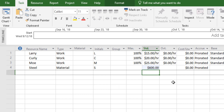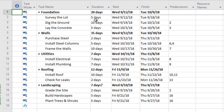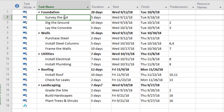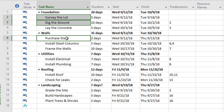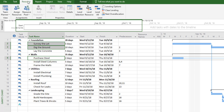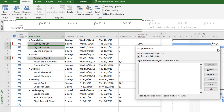Now I'll go back to the Gantt chart view. If I go to the resource names column and select one of the cells, a drop-down appears and I can see those resources listed. I can use those checkboxes to assign resources to a task. To assign resources to more than one activity at once, I'll select survey the lot, dig the ground, and purchase steel, then go to the resource tab and click assign resources, assigning all three to Larry.